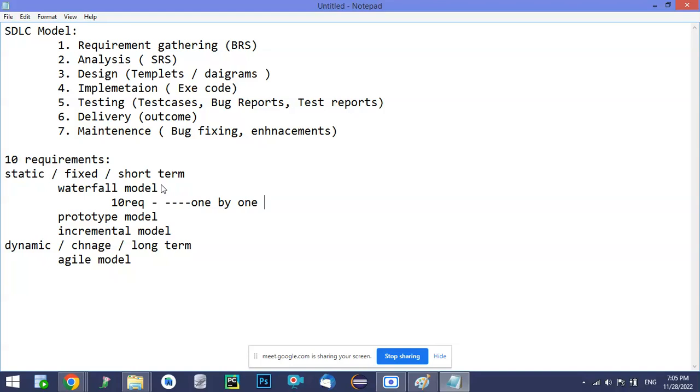But here it is a very risky process, because if we get stuck in designing, it leads to all the other teams in the lineup waiting. For example, if you planned 5 days for design but extend to 10 days, for the remaining 5 days all the other 4 teams will be in a waiting period only. So there will be a lot of waiting period.